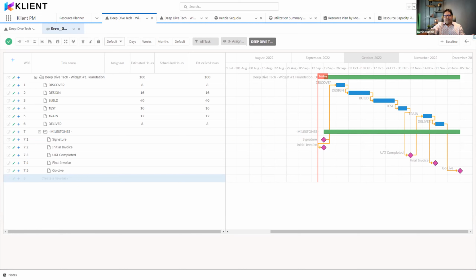At this point, we use the workspace that was formerly known as Gantt. As you can see, I'm using a very simple layout with only a few task fields as columns for this view. I want to bring your attention to the estimated hours column. The value you see here represents what we estimate in terms of effort to complete this task. If you look at the scheduled hours, you will see the time scheduled for the yet to be assigned resources.